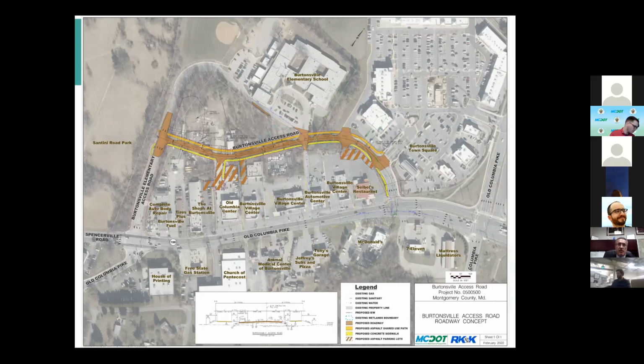The first time that I designed this project, without getting into the technical details of it, we were putting a small pond facility in pretty much where the junkyard area is. And I believe, as I said, we haven't reached the end of preliminary design. I believe we're going to end up with that, but that all hinges on what my colleagues in the Department of Permitting Services would approve or agree to allow us to do. The new stormwater management guidelines prefer other means of addressing stormwater management, but based on my experience, a lot of those probably would not work here for various reasons.